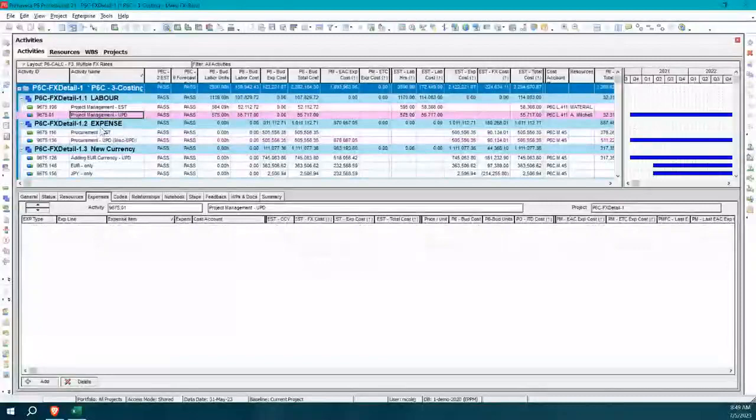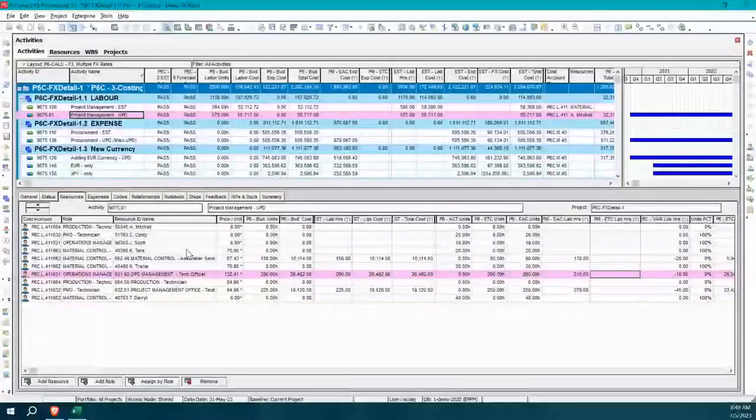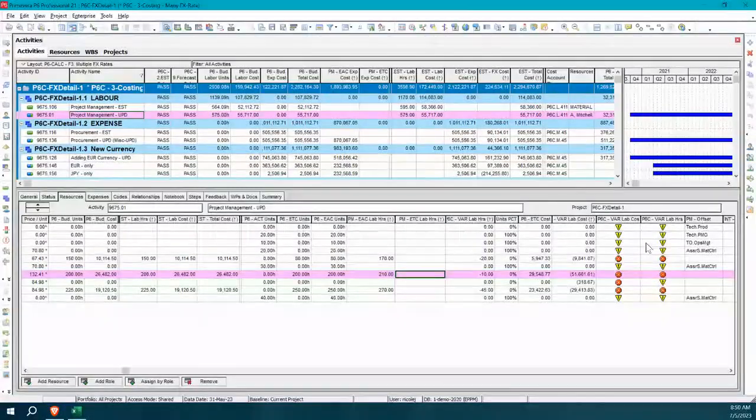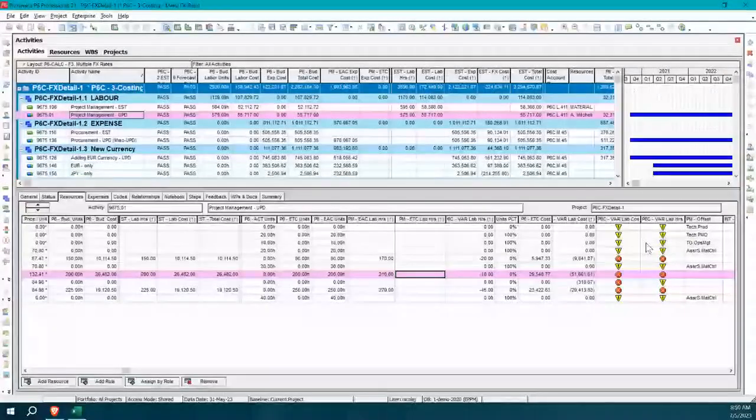And that's this one, the updating, and we'll go back. So based on the values that I put in here, it's going to recalculate the estimate to complete. It's going to give you whether you're up or down. So you can see the variance, which is important because, of course, that has impact on where you're going to end up and an impact on whether you're going over or you're under. Very important to be monitoring that.